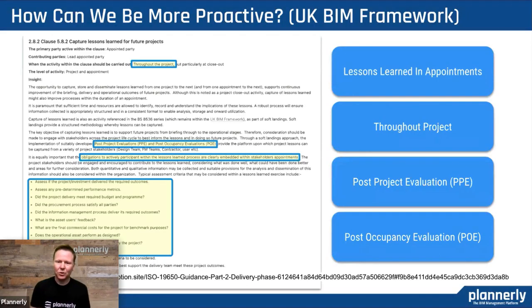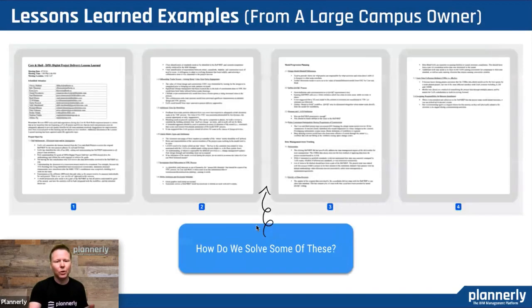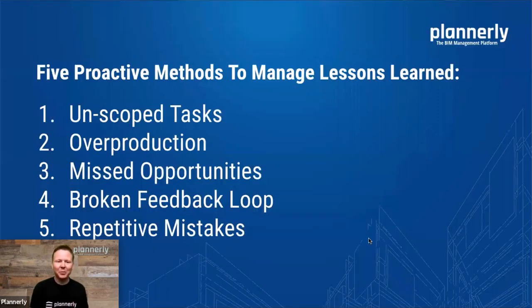Absolutely. And one of the great resources is the UK VIM framework — they unpack the concept of lessons learned a little bit more. There are a few really key concepts. One is making it part of the team's appointment documents, making sure that they're aware of it contractually, making sure that it happens throughout the project and not just as an afterthought at the end. Also providing templates and ideas around what you could do. We have excellent examples shared with us. This is a great one recently from a large campus owner — it was quite fun to put together just five proactive methods to manage the lessons learned process to make it easier.